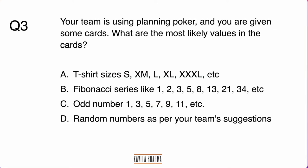Third question: your team is using planning poker and you are given some cards. What are the most likely values on the cards? If you said T-shirt sizes, that's probably wrong. The Fibonacci series is one answer that could be right. Odd numbers — no. Random numbers as per your team's suggestion could be, but the best method is using the Fibonacci series.